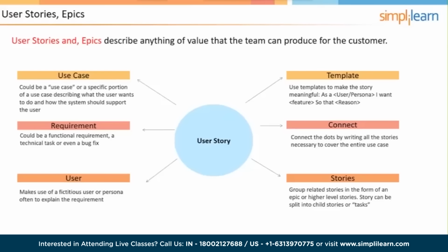User stories can be estimated in story points or ideal days. Most teams favor story points. They might start with ideal days, but they will then usually end up going to story points. Tasks are estimated in ideal time, which is usually hours.